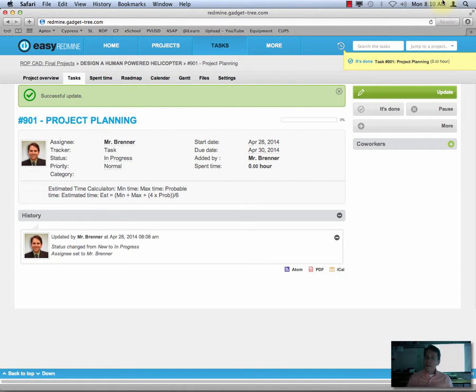Okay, so what we're going to do now is start breaking up our project into our deliverables and tasks. So the method I like to do is first brainstorm all the possible deliverables that I'll be creating for my project. As a reminder, deliverables are actual things, nouns typically, tangible objects, or at least something that you can show as a result of the fruits of your labor. So your labor is actions, the actual work that we're doing, those we call tasks. So it's after completion of so many tasks that you will then complete your deliverable and actually have something to show for your work.